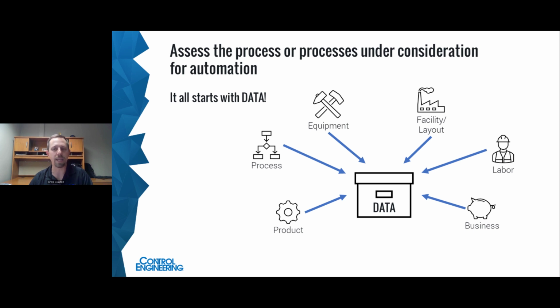And a lot of the information we're receiving in this category is required in order to pinpoint potential facility modifications. Do we need to pour new concrete slabs to handle heavier machinery or equipment? Where are the columns at? Another big thing that will always bite you later down the line if you don't have that information first thing.